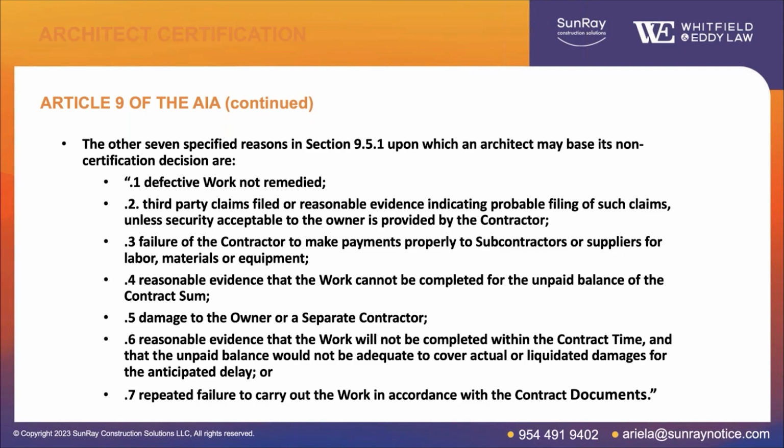if there's third-party claims filed or reasonable evidence indicating probable filing. And so, for example, if a subcontractor calls up the architect or owner and says, hey, I'm not being paid, that could trigger this reasonable evidence of filing of claims. And I know I've dealt with a lot of these type of situations for contractor clients where a subcontractor is complaining about not being paid and the owner's making inquiries and the architect's making inquiries about, hey, can you show us evidence that you're paying these people?